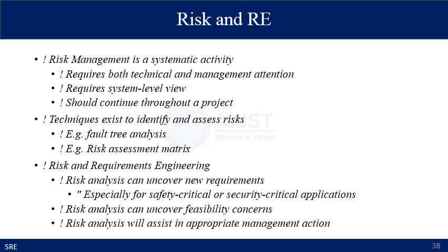For example, fault tree analysis and risk assessment matrix are two examples. Risk and requirement engineering go side by side, and risk analysis can uncover new requirements, especially for safety critical applications. Risk analysis can uncover feasibility concerns. Risk analysis will assist in appropriate management actions as well.